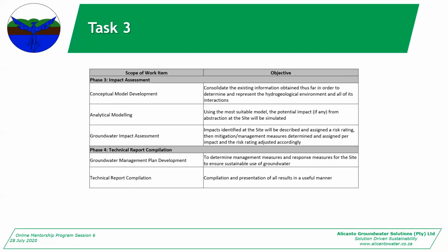Using the results of this analytical model, you'll do the groundwater impact assessment to identify your impacts at the site, to describe them and to assign a risk rating, then propose mitigation or management measures, and you reassign your impact and risk rating after you've implemented these measures.